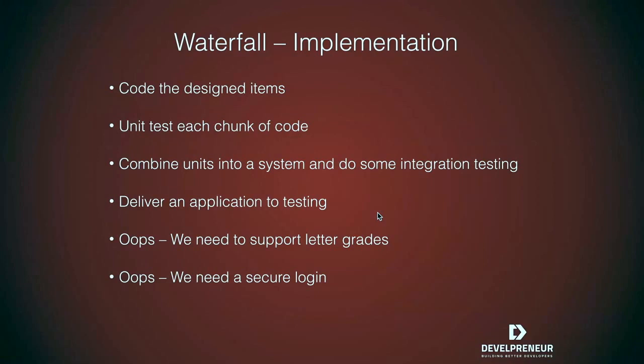And so you're stuck with this. If you're a product owner or a project owner, you have to look at it and say, okay, we've been asked to support letter grades. Do we really need to do that? Or is that something where we say, nope, we're going to push that off and pick that up in the next version? Probably that one we're going to say, all right, we're going to pick that up in the next version.